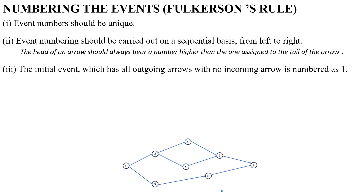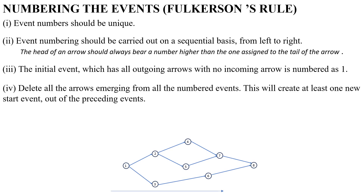Third rule is, the initial event which has all outgoing arrows with no incoming arrow is numbered as 1. So, you always have to give the number 1 to the starting event.